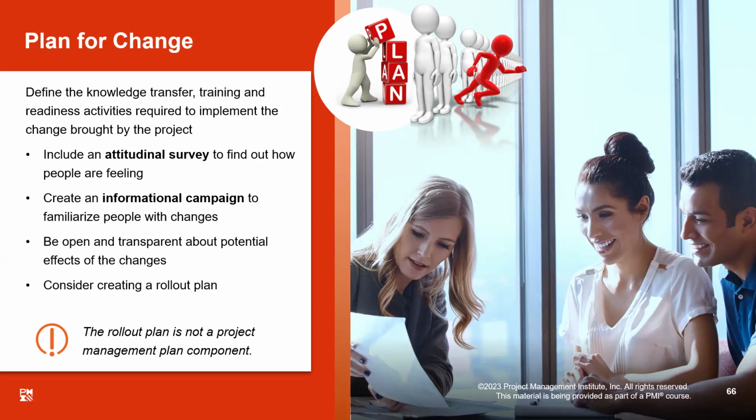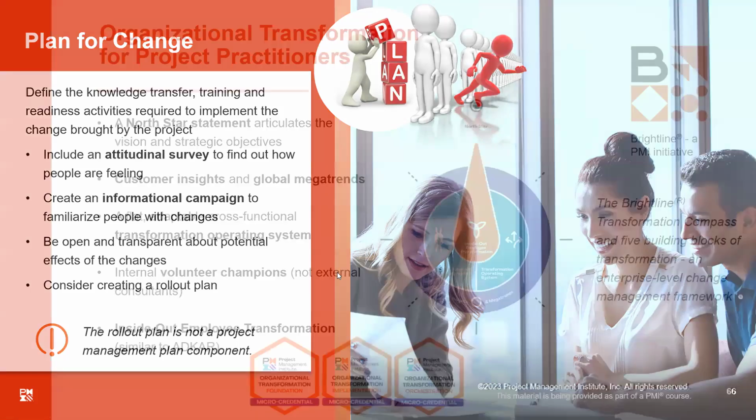So this rollout plan is not traditionally considered as a component of the project management plan. Just like business case and benefit management plan are not components of a project management plan. Because project management plan from the change management cycle is an action, right? So rollout plan is to be prepared by the business analyst. So this is how we plan for change.